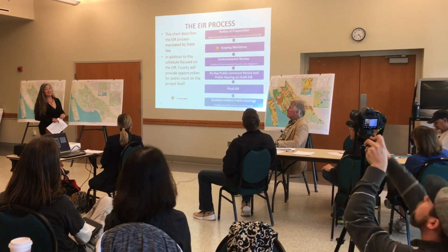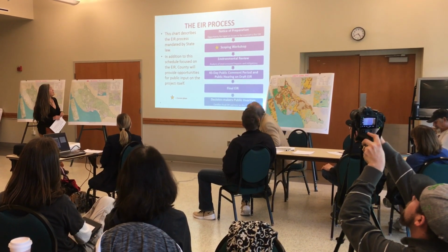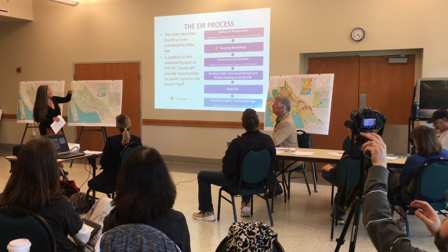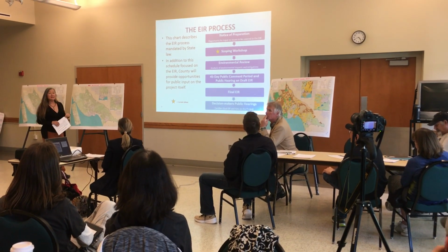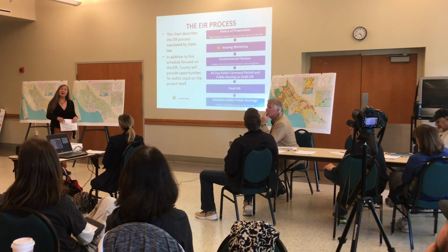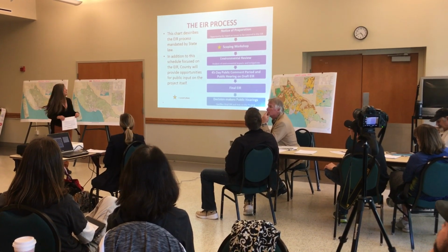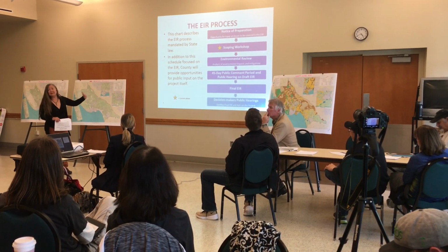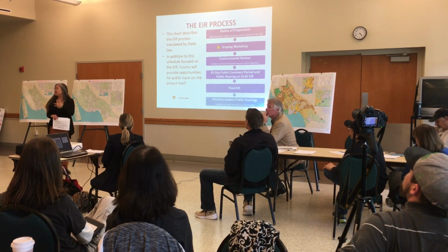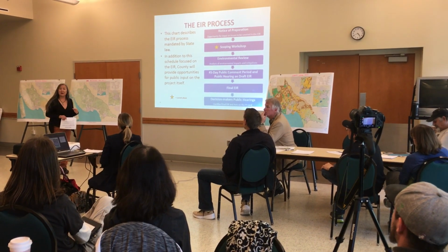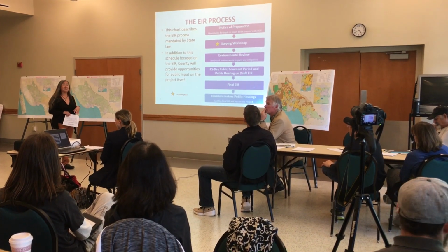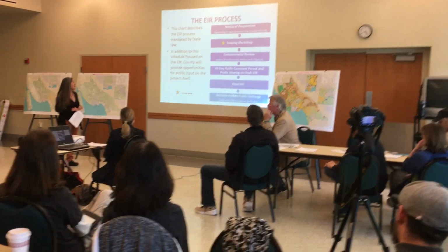So this slide pretty much shows you what the EIR process is in a nutshell, and where the star is, where we are today. We prepared the notice of preparation. We're having a scoping workshop to look at the comments you have on our approach to the EIR. Then we'll conduct an environmental review considering those comments. And again, the comment period is 30 days, so you have time still to make your comments.